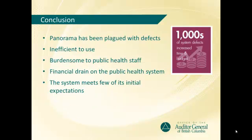Panorama has been plagued with defects from the start. BC was responsible for accepting Panorama from IBM — that is, verifying that it met all contractual terms — on behalf of all Canadian jurisdictions. The Ministry relied heavily on IBM to test the final product, which is an unusual practice that resulted in the Ministry accepting a deficient system with thousands of defects. At the time of acceptance, Panorama contained almost 1,200 defects. Since its deployment in 2011, over 11,000 more defects have been discovered. Today, approximately 2,500 defects continue to affect users, and new defects are discovered regularly.